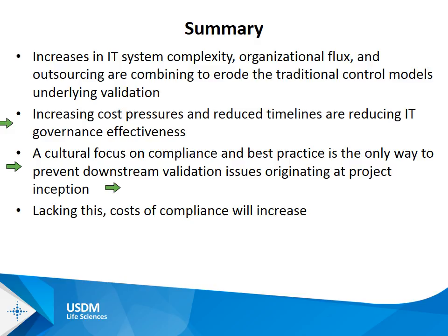Putting a step in to actually assess validation readiness before you do your validation is very important. Often it's not done, and people basically think it's just a natural process of finishing the scripts and approving the scripts. The system may be way behind what the script expectations are. And if this isn't done, your cost of compliance will increase in terms of what does it take to get a signed off validation protocol and a final report. All these complexities and the lack of addressing them early will certainly take its toll late in the process.